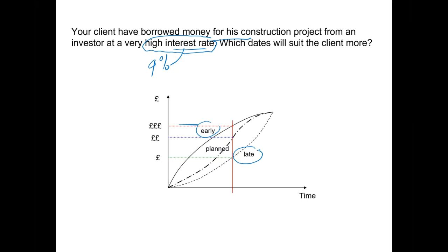So basically, your project is sensitive, and if something goes wrong, your project will be delayed. Or you could use some sort of median approach, a middle of early or late start time, to get the best time cost curve. Now we will discuss this, but this sort of extreme graph between early and late time is also referred to as a banana curve. And this is also used for planning and controlling the project. So when we are executing the project, we try to stay within this banana curve.